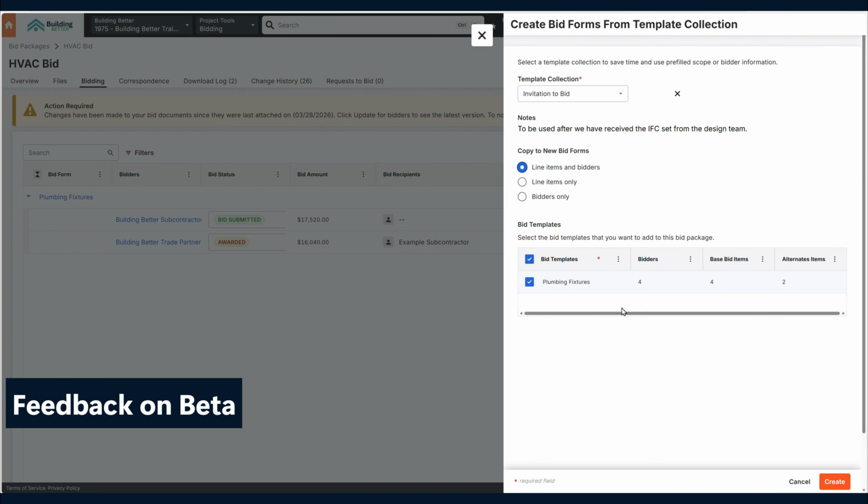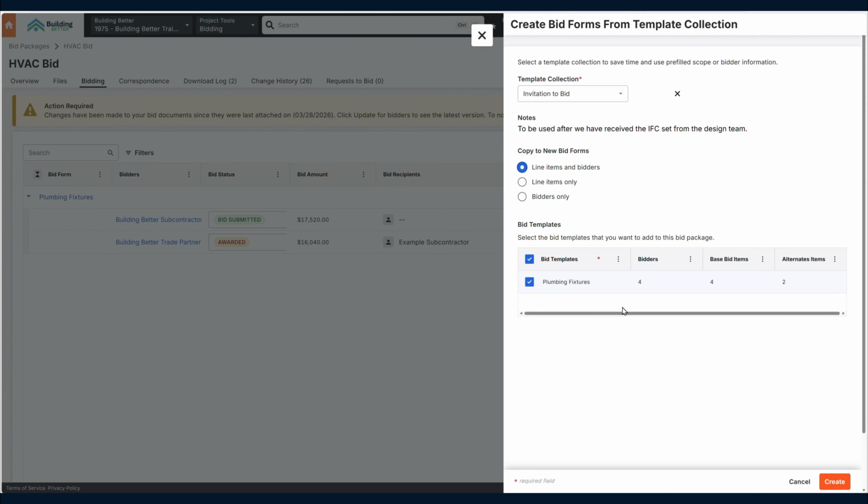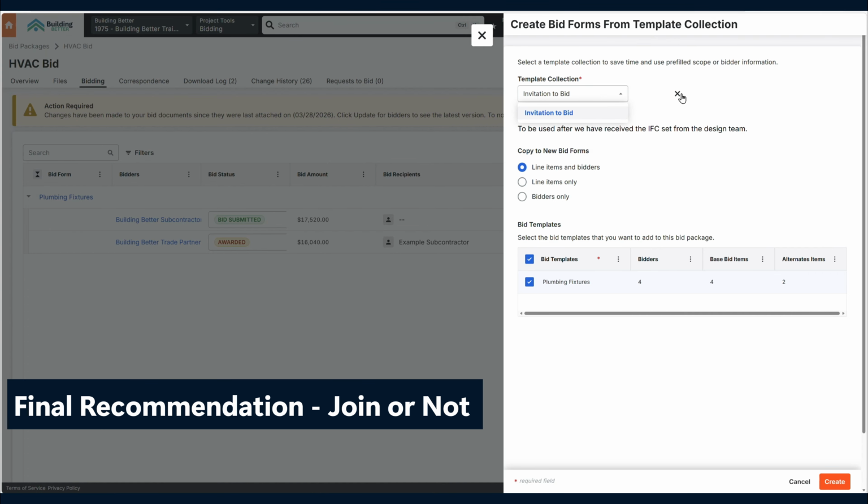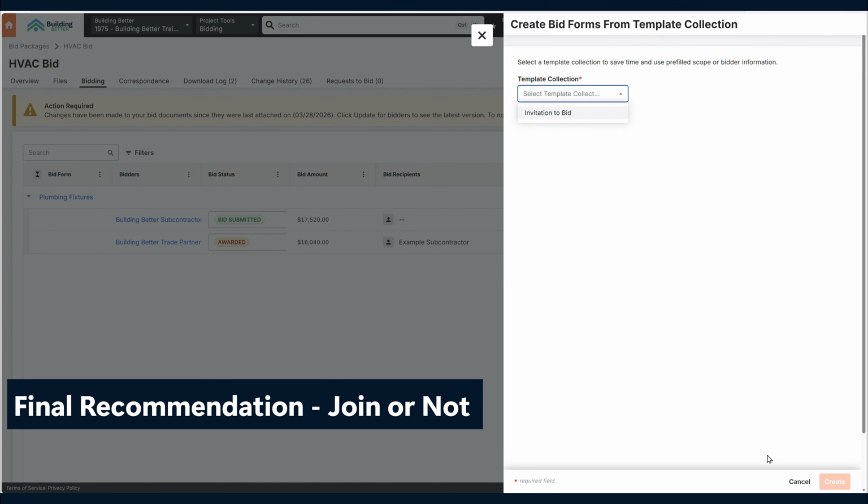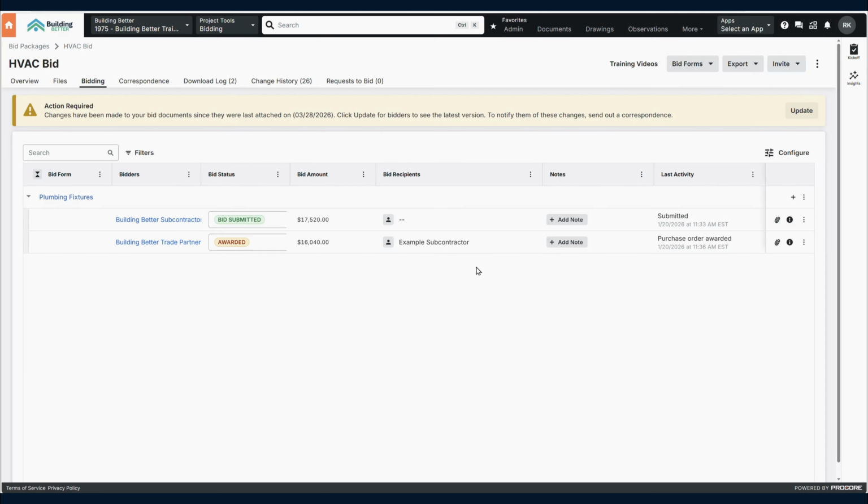So that's really all that it's used, not all that it's used for. This is really helpful, don't get me wrong. Like I would use this for your project, get set up, have a company level template. You can use this as like your selected bidders, like your short list of bidders, people that you've approved. So get them on this bid form, and basically you have to start from this bidder list if you have like a pre-qualification process. So go ahead and start setting this up for your job.